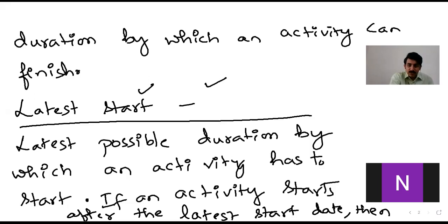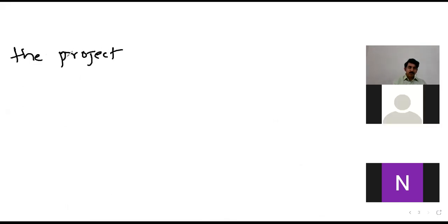So that is the reason we are calculating this latest and earliest start. If an activity starts after the latest start date, then the project duration will be postponed, and the project duration will also be delayed. I hope that you are making note of whatever I'm writing on the whiteboard.